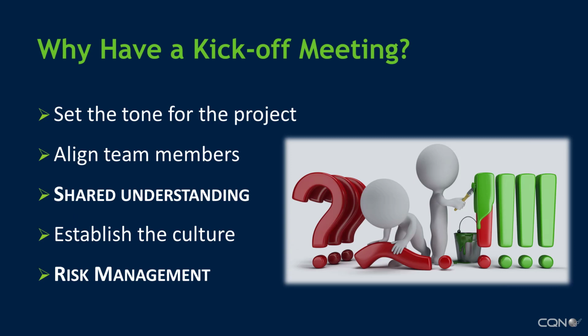A well-planned and led kickoff meeting will set the tone for the work. An outcome of mutual understanding of the project's goals establishes familiarity with and ultimately trust in project team members. And it's where the project culture gets started. So it's vital that the key players from client and contractor teams participate and move the ball forward. For projects that go off the rails for budget, schedule, quality, or safety, the root causes can often be traced to the planning stage and the project culture established at the beginning of the job.